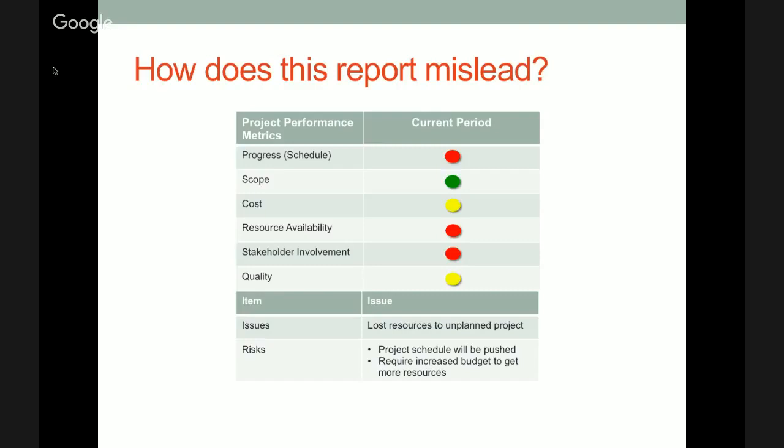Make sure that these indicators, whenever possible, you're doing a quantitative assessment instead of a qualitative. So you don't end up with PMs who are reporting something as yellow because their instincts tell them that it's yellow, so that the yellow actually means something to the organization.